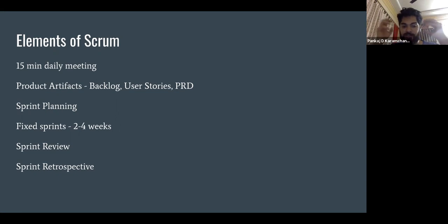Lastly, you can do a retrospective of each sprint. You can think about, okay, I rolled out this improved login page in my last sprint, and I'm noticing an improvement in the number of signups I'm getting. Maybe it's by 10%, 20%. So the thing we shipped in our last sprint was successful because it gave us a positive outcome. So you're retrospecting on what the outcome of that last sprint was.